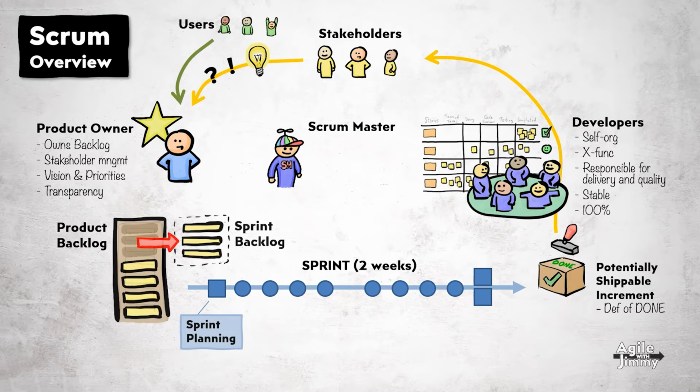Each sprint starts with the sprint planning, where the whole team defines a goal for the sprint, pulls as many items as they think they can finish within the iteration, and breaks down each product backlog item, aka user story, into small, well-defined tasks. The planned work doesn't only originate from the product backlog. A team often receives asks from other teams, has their own ideas, and unforeseen urgent things they need to execute on.